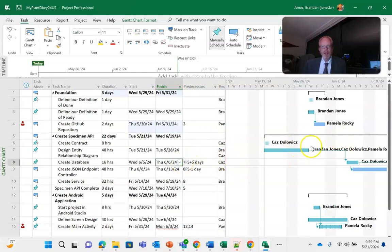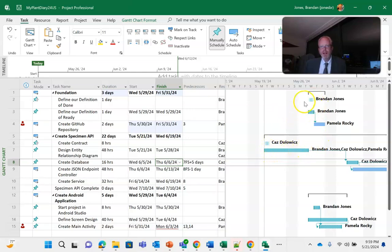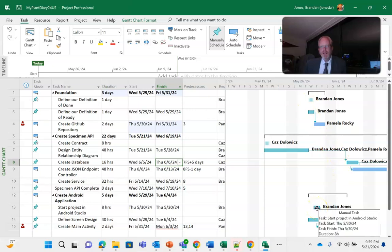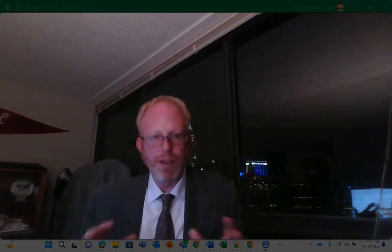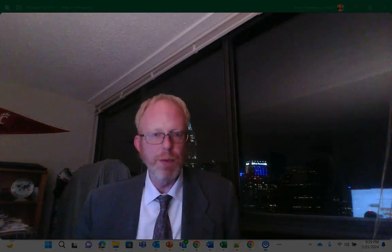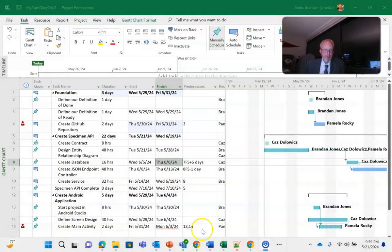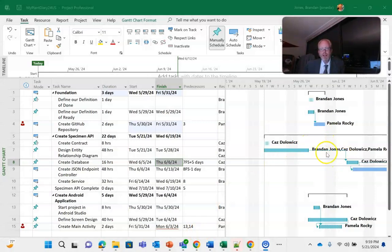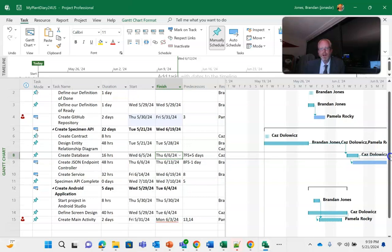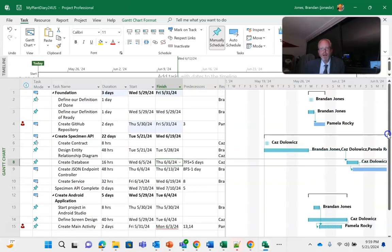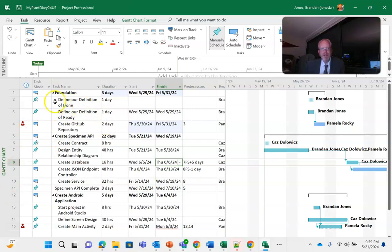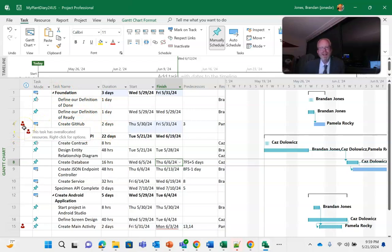We have Brandon starting on this task, then Brandon is needed up here, and then Brandon works on this task and several others. So you see what it did is it effectively shuffled things around to make sure that I'm not working more than 40 hours in a week. But in doing so it did create some gaps in our predecessor and successor relationship that we didn't have before because it's looking for the best way to allocate me. Incidentally it looks like since I stretched out this foundation task, I'm now over-allocated again so I might need to go back and re-sequence that a little bit.